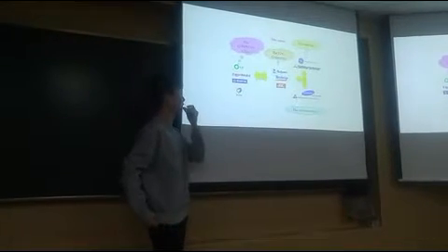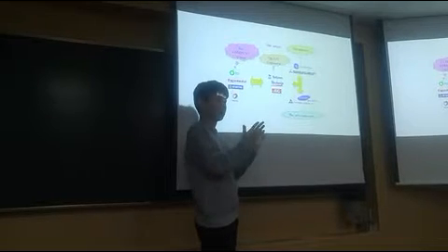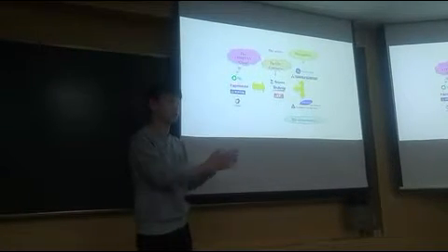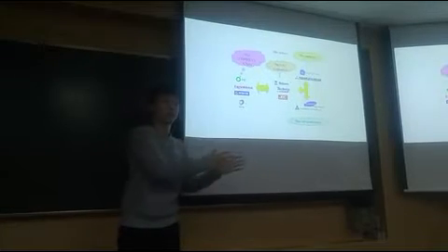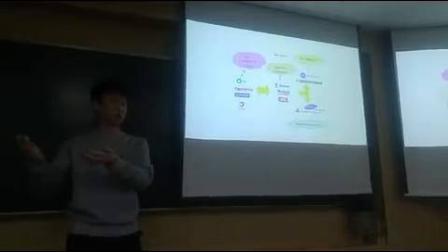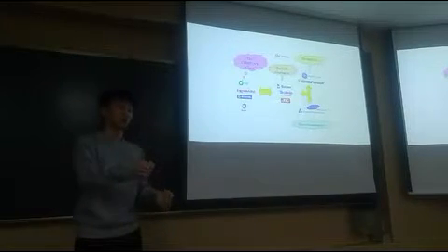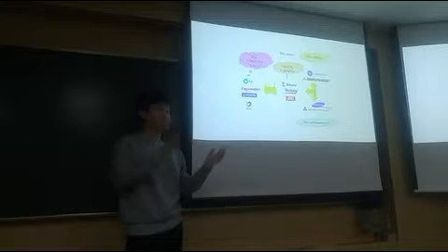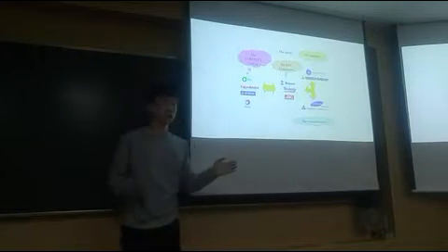But nowadays, one company can do all four things, from the FEED and engineering, procurement, and construction to the commissioning and installation. It's like when you buy a car, you don't find an engineer for a car and receive the design and go to the car factory and make your car. You will just give your money to the car dealer, and the car dealer gives you a car and you put the key in it and turn it and drive. So if the client company gives just money and a contract, and just one contractor does it all, it is called a turnkey contract.